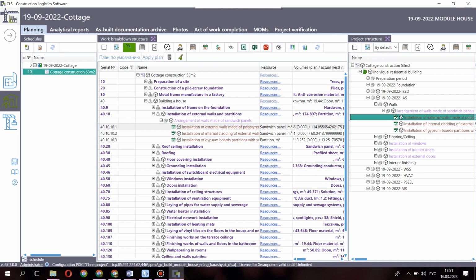The distribution of the volume of work on the divisions is carried out by establishing a connection between each assignment and the selected division. An assignment can only be linked with one division. Information on the amount of work is generated in each division when assignments are distributed by divisions.